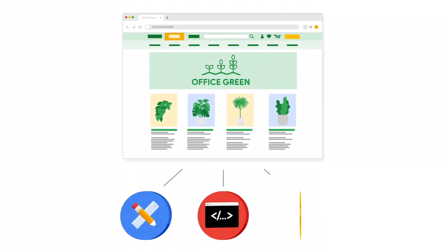In your plan, you need to break this information down further. You're creating a new website for this service, so you'll need to break that deliverable down into smaller milestones, like kicking off a meeting with the web developer and gaining stakeholder approval. And those milestones will break down into smaller tasks, like mocking up a design of the new website and developing a landing page.